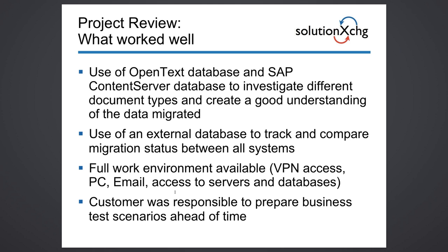So what worked well? Really, these turned out to be for us very important details. We used the OpenText database and the SAP Content Server database to investigate the different document types and upfront create a good understanding of the data migrated. So instead of running into panic mode if something wasn't retrievable or created a problem, we did a good analysis upfront. So zero